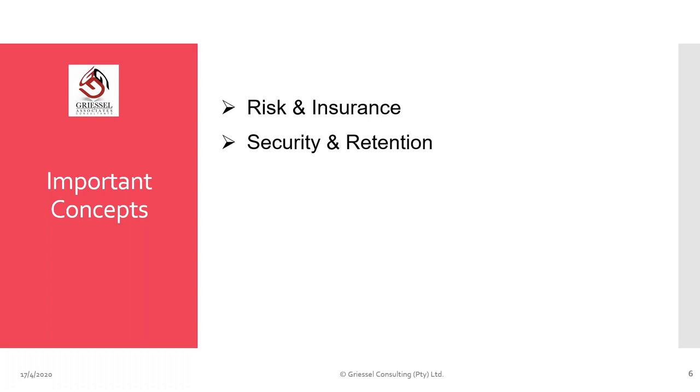Now, I'm sure you're all very well aware of force majeure and vis major at the moment after the lockdown and the responsibilities that were carried by that. Now, any costs that are lost because of that lies on the client. For instance, the extension of time and the losses that go with that. The client also carries responsibility for latent defects in any materials that were specified by trade name.